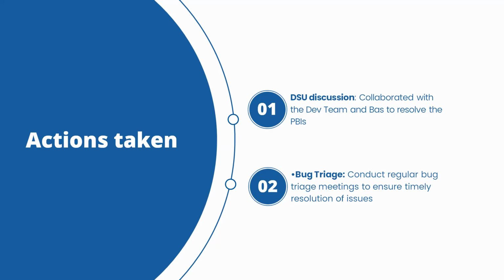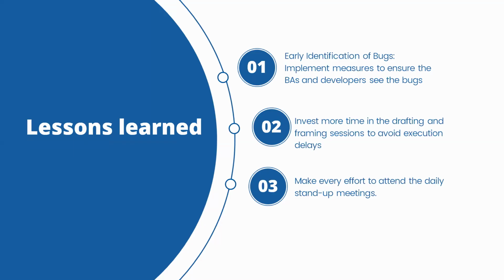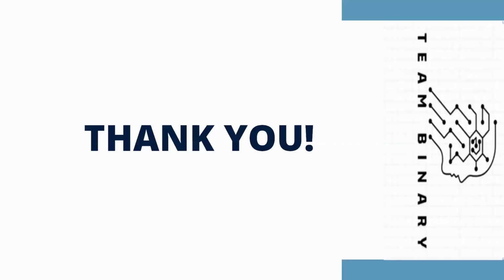One of our developers also mentioned to always tag their names within the discussion section of each PBI that fails. Next slide. So the lesson learned is early bug identification, and going forward, we will be tagging the appropriate BAs or developers to each failed PBI. We would also be ensuring that we join the daily stand-up, because I believe this was also raised by the SMs. I think attendance was poor at some point, in the last 3 weeks. So we've taken all of those into consideration. Next slide. I think that's about it. Thank you very much. Cheers.